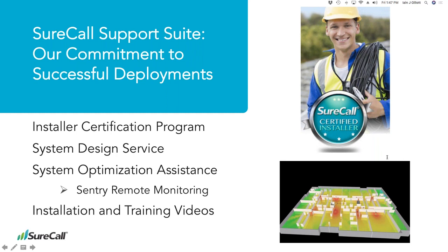What's great about public safety is it's coming down the line to where it's a necessity. Buildings are going to have public safety signal, especially new buildings. If the authority having jurisdiction, whether the fire marshal or whomever, walks into a brand new building before it's open and it doesn't have negative 95 dB worth of signal strength, that building owner will not get their certificate of occupancy. And so then it's a scramble.